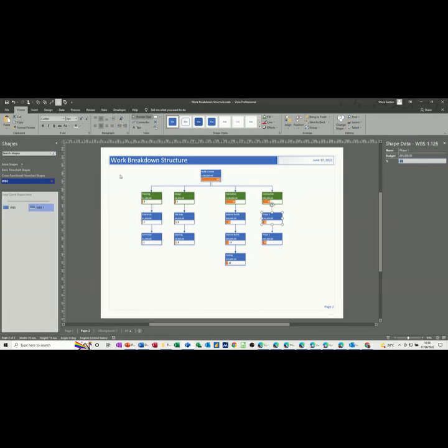And that's basically how you do a work breakdown structure diagram using Visio, using your custom shapes. This is the key, I think. If you go on the internet, there's lots of different styles for this. You've got a phased-based work breakdown structure, which is slightly different. This is a better example, I think, a deliverable-based work breakdown. So you've got all the deliverables listed under each of the headings and how they fit into the overall picture of this, which is build a house, 200 grand, 100% of the work will complete that.